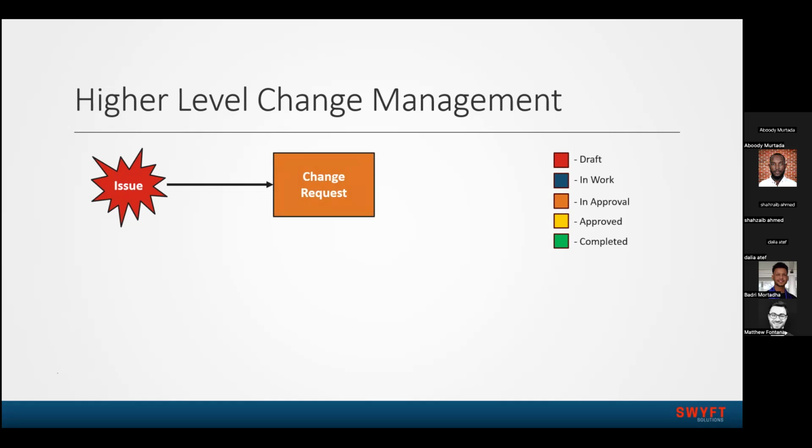Generally at a larger organization, they have a change board where they'll sign off on moving forward with changes like this. Once the change request is approved, it creates a change order automatically. And this is kind of that next layer. And these two things here are not included with what I've shown so far. They're the added layers of approvals.